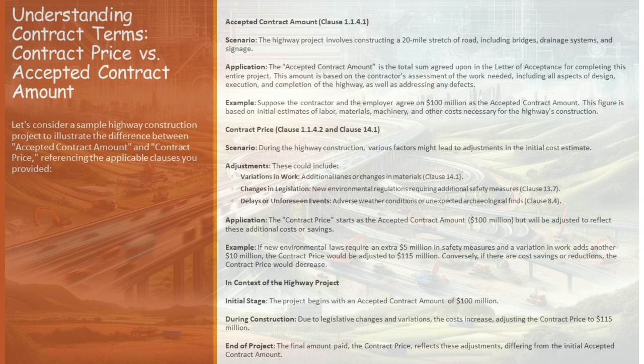As we piece together these scenarios, the story of our highway construction project takes shape. From the initial handshake at $100 million to the current standing of $118 million, the journey of the contract price is a testament to the dynamic nature of construction projects. Each adjustment — whether due to variations in work, legislative changes, or unforeseen events — reflects the realities of the construction world. They underscore the importance of flexibility, foresight, and continuous negotiation in managing large-scale projects.